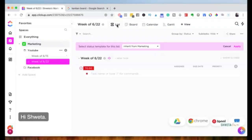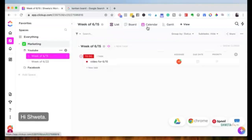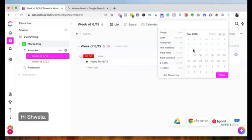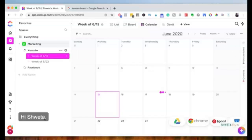Within each list you have your tasks, and you can go into each task to create subtasks. In the board view you see columns; in list view tasks appear as a list. In calendar view, if the video task has a due date of the 15th, you'll see it appear on that date in the calendar — making it easy to track what's due when.